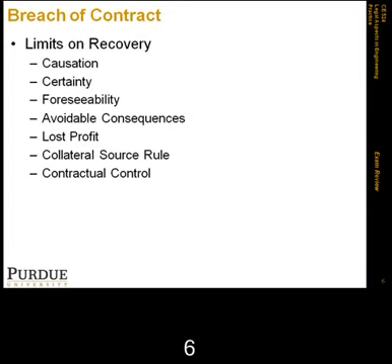Examples of those are liquidated damages in construction contracts, and sometimes there may be language to protect parties or limit their exposure. And basically the Uniform Commercial Code allows parties to spell out their remedies for breach, but does not preclude them from going after more damages if the remedies in the contract were not sufficient.